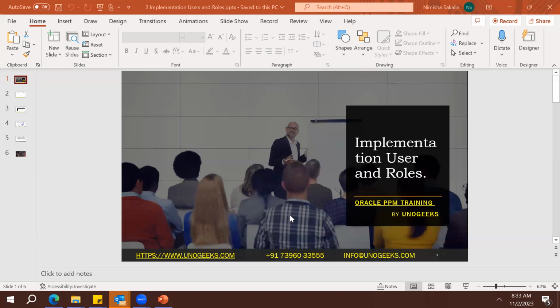So what the resource manager does is, in resource management, we maintain a pool of resources. His task is to maintain that. He cannot allocate a resource to a particular project or delete any resource from the project. That will be taken care of by the project manager only.